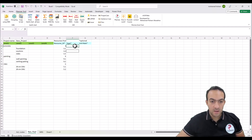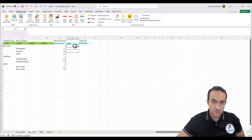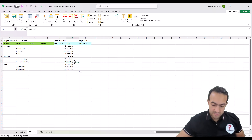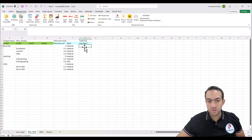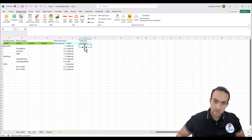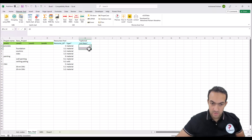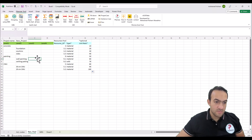For the type field: if you leave it blank it will be considered as a label — you can change it later. But if you want material, you can simply write 'material'. If you have an error here you will see it. The unit rate can also be zero, or if you want to add the unit rate from your BQ you can write the numbers.